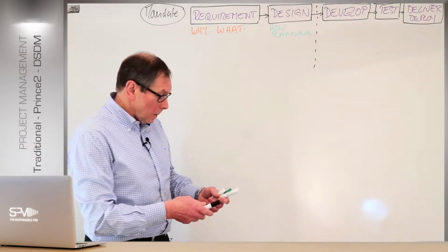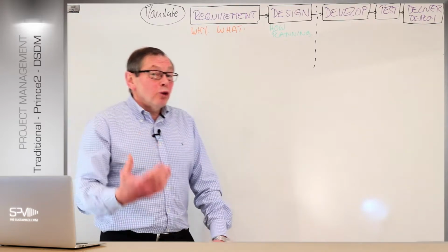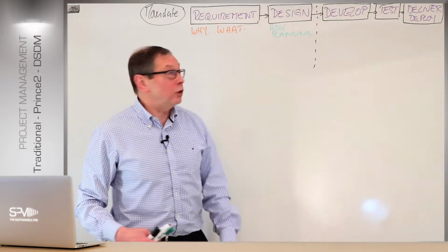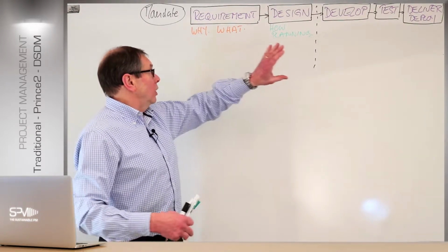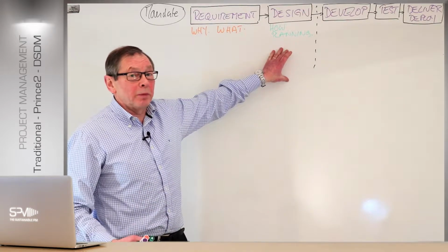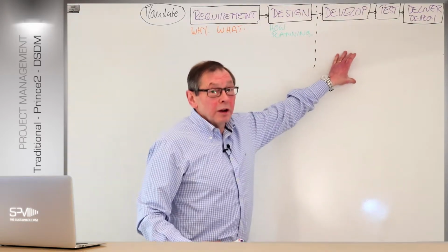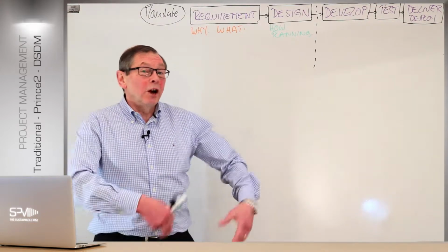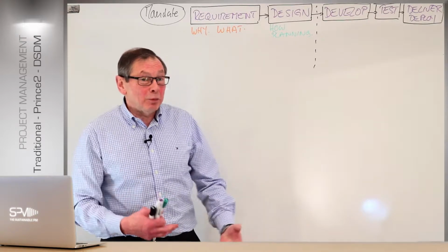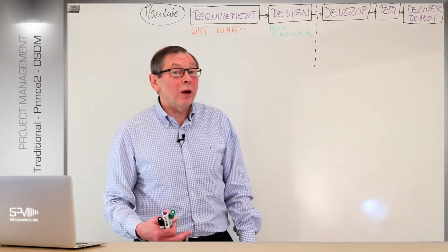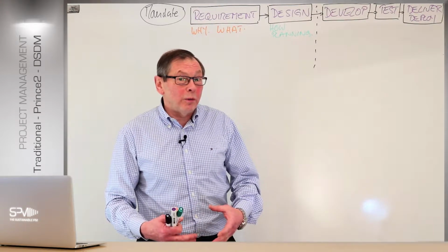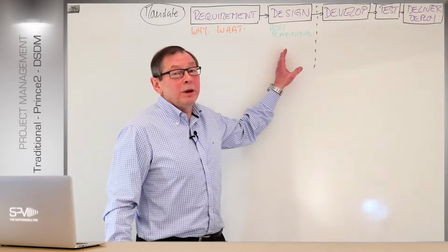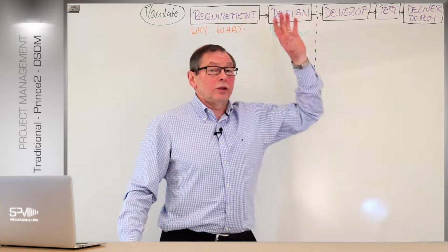Very important. Okay, now, the traditional waterfall view is that this tends to go down. It's like a waterfall from the top to the bottom. So we go through requirements, got that in place, sign it off, go into design, put the whole detail and spec in place, sign that off, develop it all, build the whole solution, test it towards the end, and then hand it over. Of course, fling it over the fence after a period of time could have its problems, because by the time we get to test it, maybe things aren't coming right. And the danger is now we have a problem, we're running out of time and budget for the project. But the point is we get a whole detail here, big design up front as it's called, develop that solution.